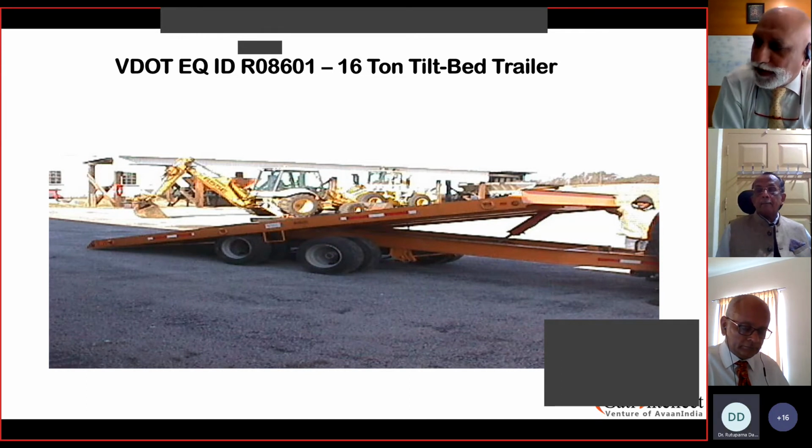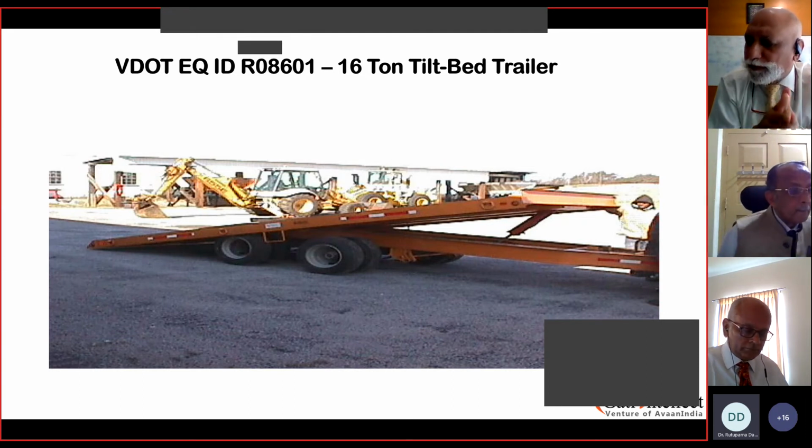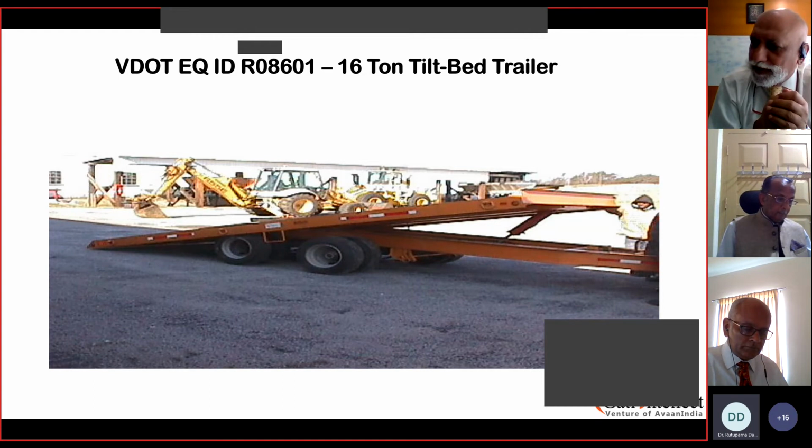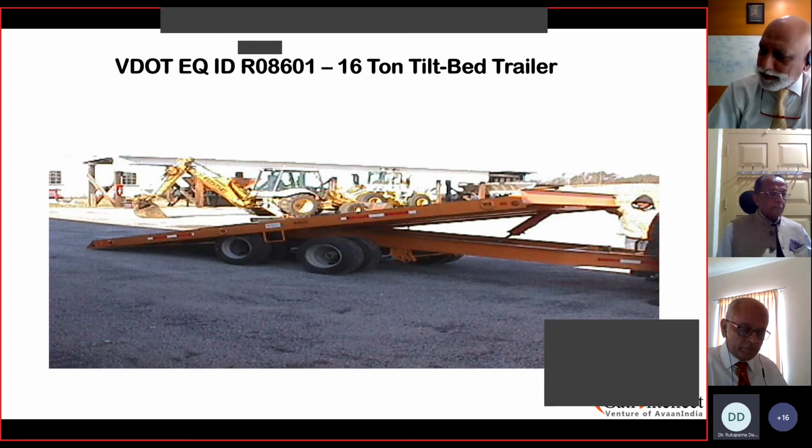Now, if you look at the specification, it is not specifying the process of loading to be taking place. It is not specifying what are the safety parameters to be adhered to when the product has to be loaded onto the trailer. With the result, the vendor who will be undertaking the transportation may not follow the norms of the loading or transportation or lashing the product before it goes for transportation, and may compromise on the safety. So the observation here is that what kind of trailer is required for loading, the specification has not been clearly defined. Can you go to the next slide, sir? Yeah.